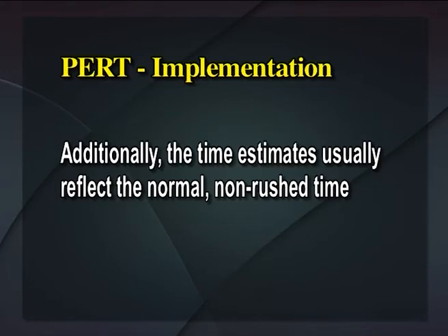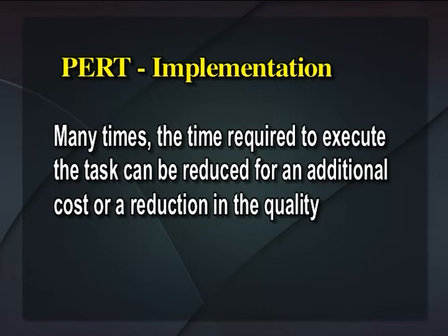Additionally, the time estimates usually reflect the normal non-rush time. Many times, the time required to execute the task can be reduced for an additional cost or a reduction in the quality.